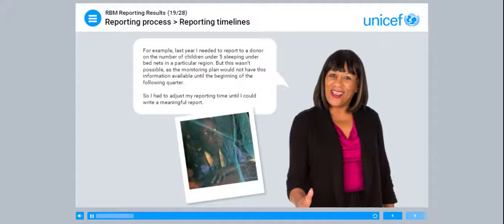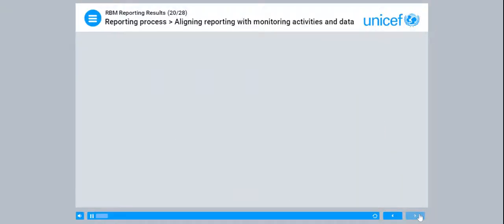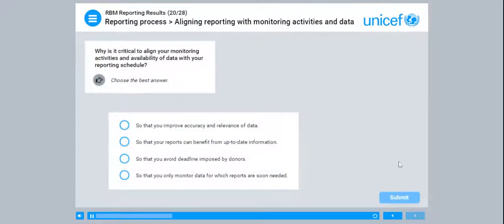For example: last year I needed to report to a donor on the number of children under five sleeping under bed nets in a particular region. But this wasn't possible as the monitoring plan would not have this information available until the beginning of the following quarter. So I had to adjust my reporting time until I could write a meaningful report. It is critical to align your monitoring activities and availability of data with your reporting schedule.